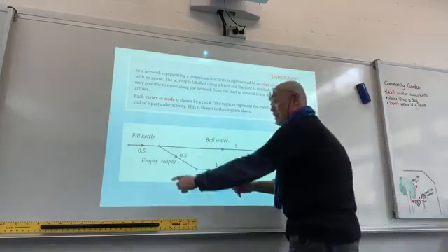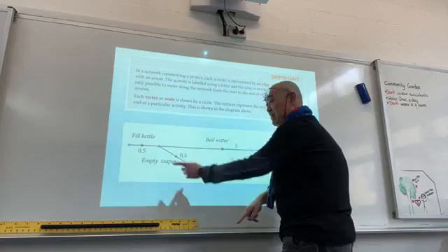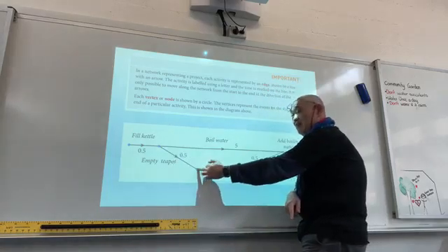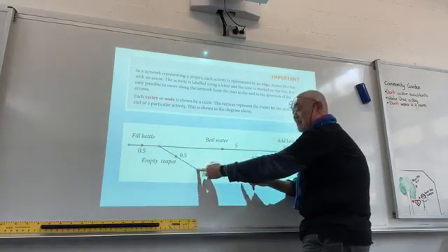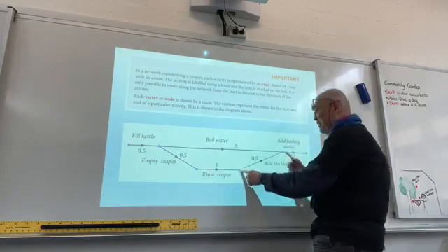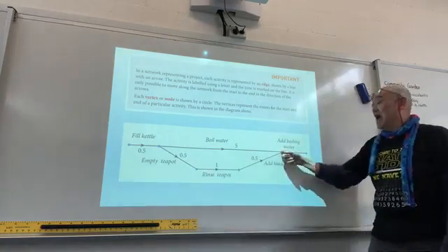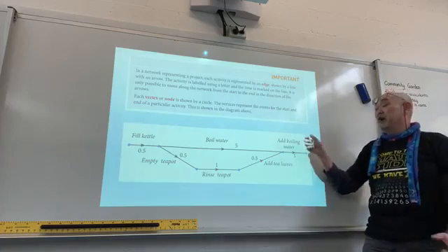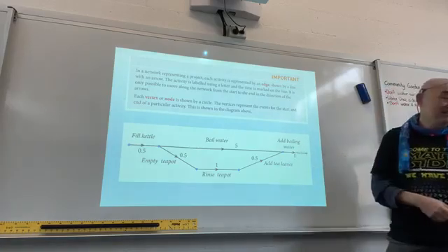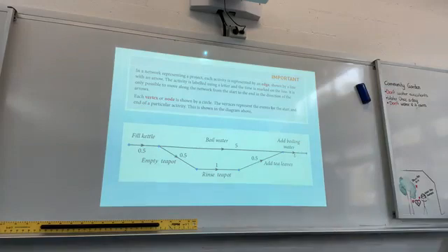While you're doing that, you can start emptying the teapot, about half a minute of doing that, rinse the teapot, 1 minute, and add tea leaves, another half a minute. And then when the water is boiled, you add boiling water. So these are the sequences of events.